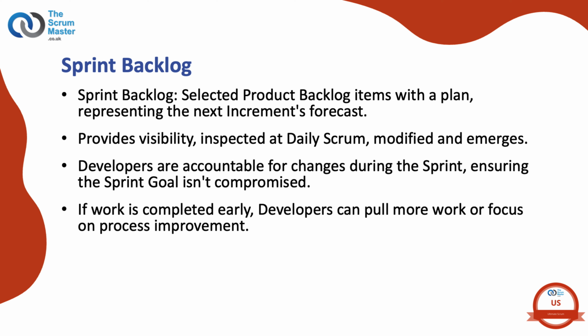It may help to think of the sprint backlog as the plan for the sprint. It is what the developers plan and how they will do it. The why behind what they hope to achieve comes from the sprint goal, a commitment to and part of the sprint backlog. The sprint backlog will change as better ways are discovered to achieve the sprint goal. This is normal and natural and to be encouraged.